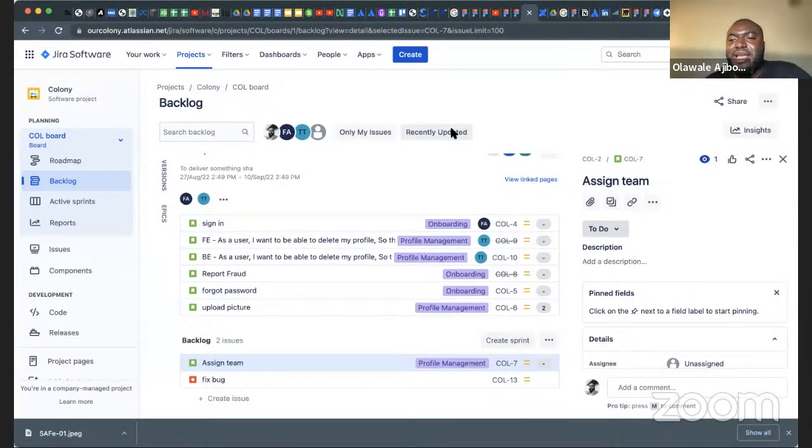15, right? Basically, the people you cut them off, right? Not cut them off in terms of shouting at them and asking them to keep quiet. No. There are certain people that have no business talking in your meeting. Also, you're not supposed to have more than a certain amount of people. Keep it very simple and short. What you did yesterday, what you do today, and if you have any issues. Your job is just listening and writing as they're talking. And on the average, you shouldn't have more than 9 people, 9 to 11, I guess.